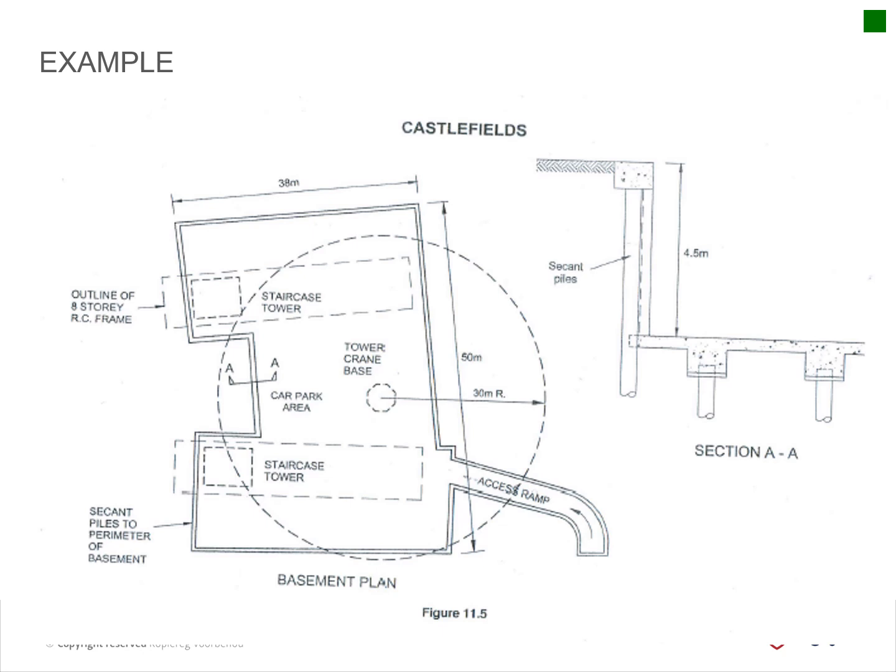The excavation works in association with removal of spoil to reduce the ground to the required level, allowing construction work to the basement piling and floor to commence. Construction work includes pile caps and bases within the basement area. The basement excavation is to take place between the secant pile wall. Access to the 5-meter deep basement is via the proposed access road. So here's the access road that they've got planned.